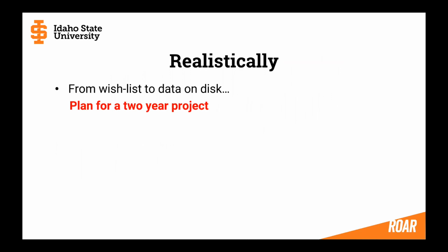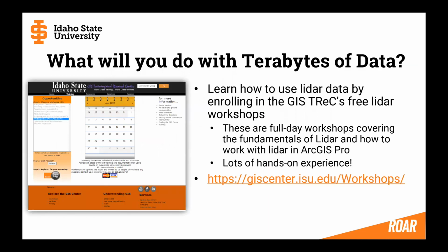Realistically, from wish list to data on your disk, plan for a 2-year project. No kidding. Plan for a 2-year project. Now, what are you going to do with your terabytes of data?